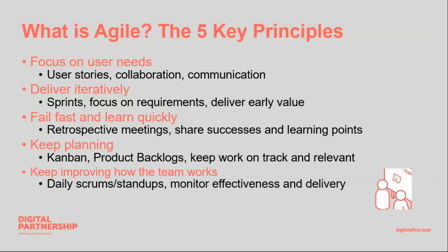Again, that's underpinned by the third principle, which is fail fast and learn quickly. The whole idea of a sprint is that you can fail fast. You decide what you're going to roll out, you try it, it might fail, but you failed quickly. You haven't taken 6 months, you haven't taken 12 months to fail. And that's underpinned by things like retrospective meetings where you look at how a sprint's gone. And it's also the place to share successes and share any learning that you've got.